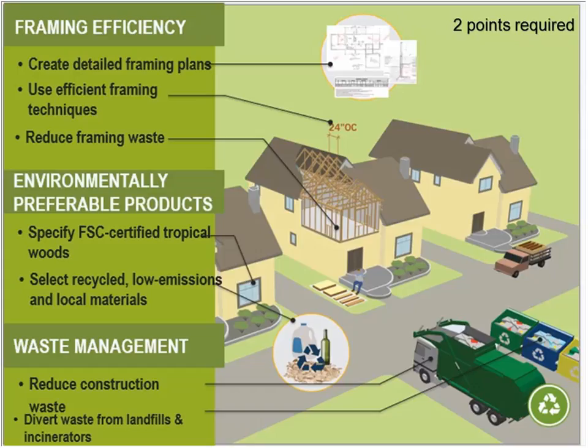And then also, if you can divert your waste, you can get more credit here. And a lot of times you can do a single source or double source and put it all in one thing, ship it out, and they'll send you a receipt to say what your percentage of recycled versus diversion is, and you can pick up your points easily that way and hopefully save a little bit of money.